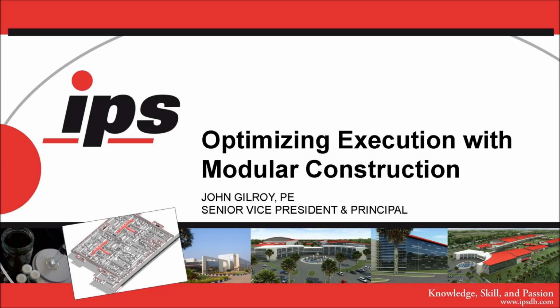There's additional interface coordination that needs to be done between the vendors, subcontractors, and the engineer. Materials of construction and compatibility and consistency need to be considered when buying a modular system, because you don't want to be having multiple types of, say, pumps or different types of valves. So those are things you have to think about when you're looking into building modules in another part of the country or the world. Transportation to the site is normally not an issue based on the shipping container or even a super skid, but it's a consideration that has to be thought about. And then future changes and future capacity expansion to skids should also be considered when you're looking at modular construction.